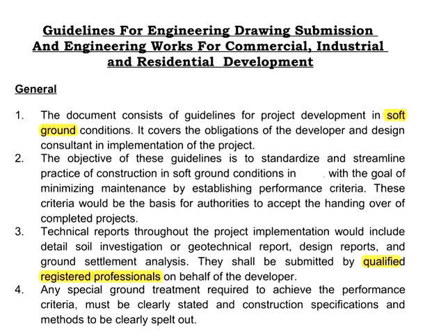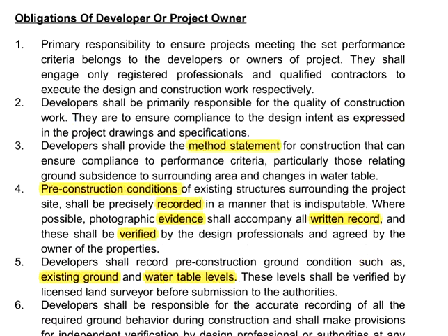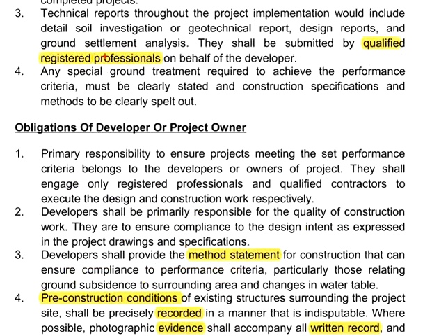Now let us look at the requirements of the local authorities dealing with project development in soft soil conditions. This is one of the examples. You may refer to your local authorities if there are any guidelines or requirements related to the development. According to the guideline, the technical report throughout the project implementation should be provided by qualified registered professionals on behalf of the developer.